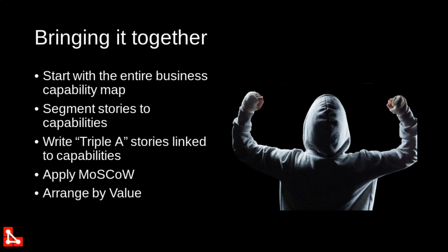Because you can have a variable scope that you're willing to sacrifice. If you're not willing to sacrifice that, you're taking away that lever, and then the only thing you can have is your budget, which is extra money. And probably also extra time, right? So apply MoSCoW very seriously, because that's the only thing that's standing between you and a budget overrun at this stage.